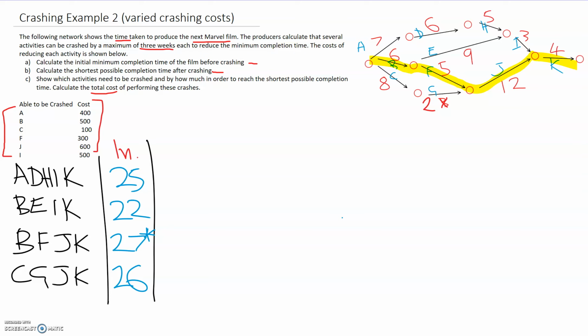Alright, here's the next type of problem. I've just begun it. So let's start at the beginning. This is the type of question we did tonight where the cost of crashing different activities costs different amounts of money. So there's only one small change when we work these out, which on the notes sheet you can see is you don't just choose any activity or start from the left. You need to crash by the cheapest activity possible, one at a time.